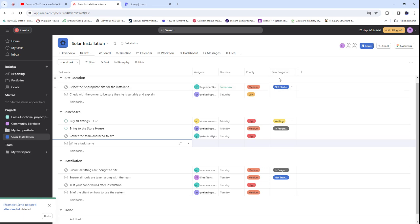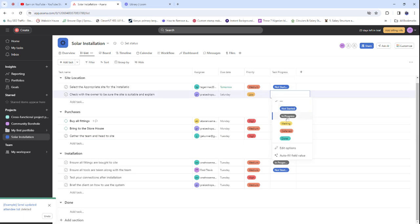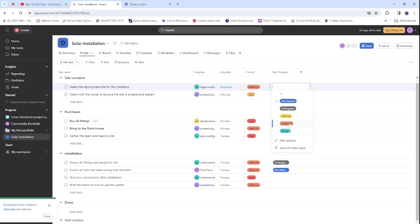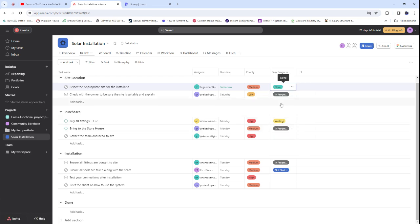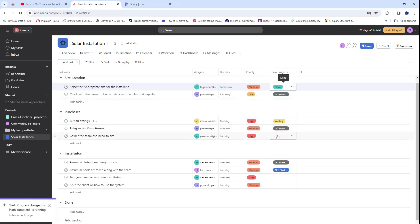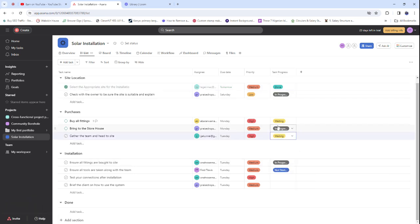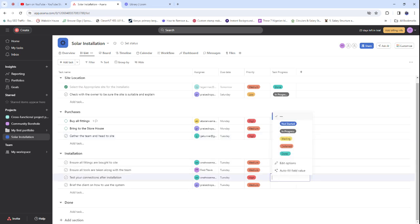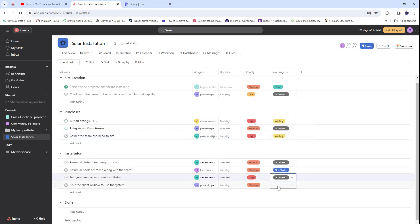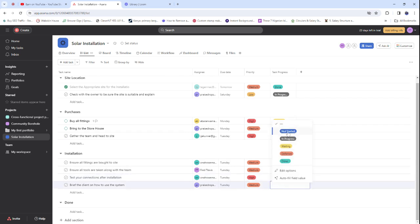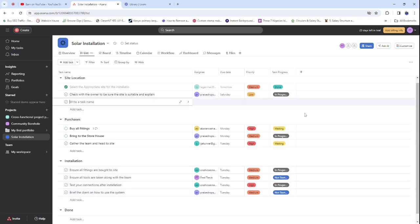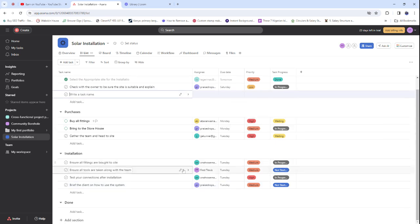Now let's set the task progress or status. 'Check with the owner' — if it's done, mark it as Done. 'Gather the team' — we're waiting for someone to return from the market, so mark it accordingly. 'Test connections' — mark it as In Progress since we're testing. 'Brief the client' is Not Started, because it depends on everything else being completed first.